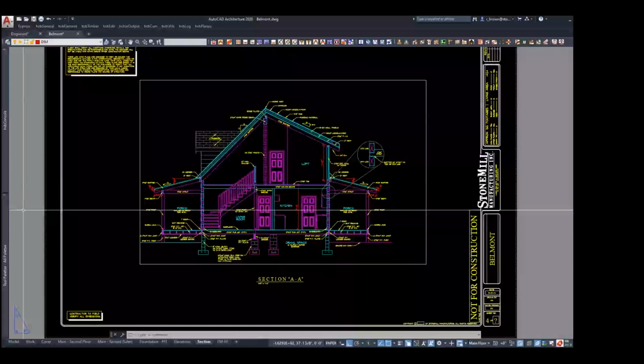Are you good? And then, like I said, since we're a Pella dealer, we'll walk you through that process if you choose to go through us, and go through all the specs and everything. And then we coordinate ordering the window and door package with the delivery of your home. So it's not like you have to be out there building and have everything in place and then place a window order. If you go through us, we'll help coordinate that. If you go through somebody else, on your own, then that's on you.